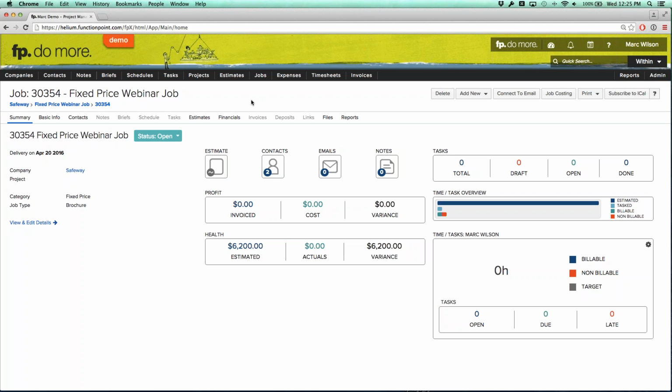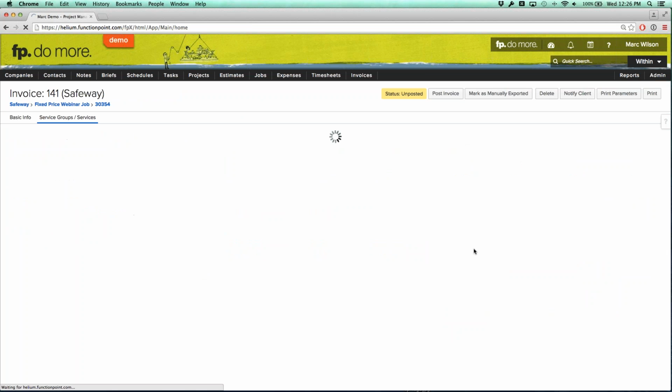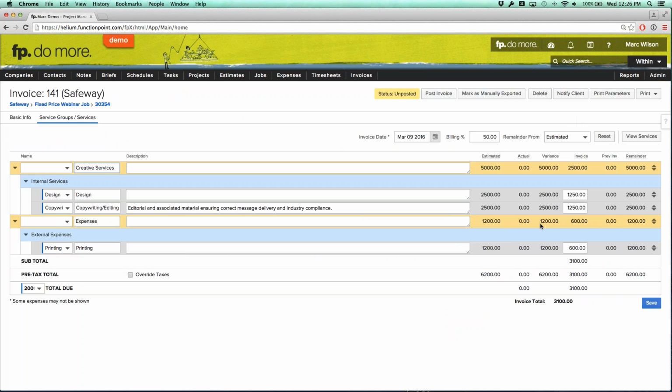Whether it's the person who opens the job or the person being notified of a new job, what they're going to do is, from the job details page, up at the top, select Add New and Invoice. In my scenario, for my fixed price webinar job, I'm billing 50% of my $6,200. So I'm going to enter 50% in my billing percentage. That's going to calculate 50% of my estimated amount, and it's going to auto-create an invoice for 50% of my estimate. Notice my estimate is $6,200, and the invoice value is $3,100. So it just fills in for me automatically.